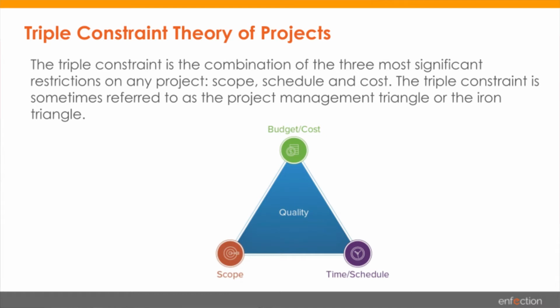When you talk about the budget, you initially have a budget for the project. If you are making any changes to the budget, it will have an impact on the time and also the scope. Because suppose now you have 5 resources for a project and you are going to increase the number of resources for that particular project up to 6. For that additional resource that you utilize, you have to spend some money. So that's a cost incurred. As a result, your time will get shortened, so you can deliver it earlier than the deadline that you have fixed. Likewise, all these 3 constraints have a relationship. One has an impact on the other, always.